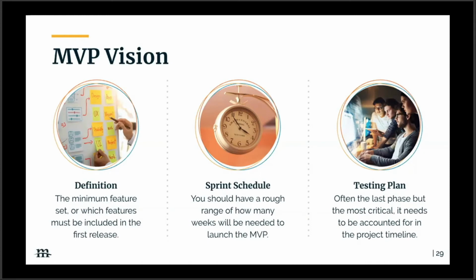As a couple of tips, there's always a tendency during prioritization to push the more complex features to a lower priority, but those features typically require more time and resources to produce. So you want to keep those at a high priority and start on those earlier in the project. And another tip, if there's a really, really complex feature, plan to build a proof of concept, sometimes called a POC, so that you don't run the risk of tying up too much of your budget and resources without having a really clear understanding of the probability of that feature viably working.